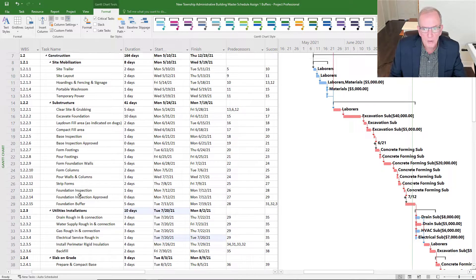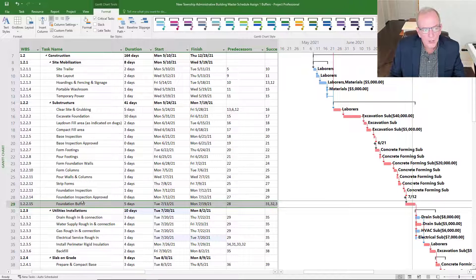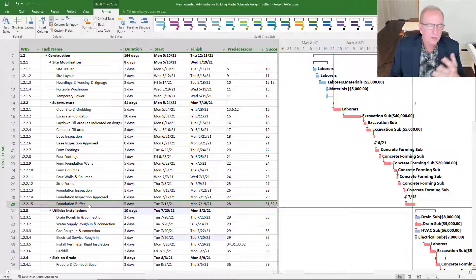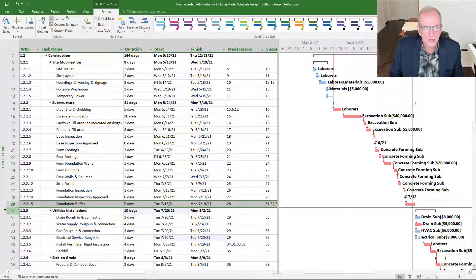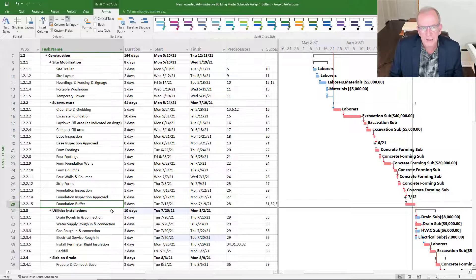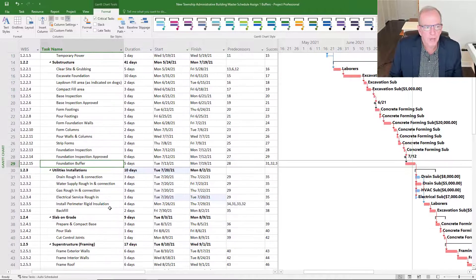What a lot of people won't like about this, particularly in construction, is: I don't want my client to see this buffer — they're going to feel it's free time. That logic can be problematic in some cases, and it depends on your contract models and relationship with clients. If this were an Integrated Project Delivery (IPD) type project, it's very easy to do this because you're collaborating, everybody's sharing in the profit, and there's a much more team aspect to the scheduling process. It's really a way of managing your risk from that perspective.